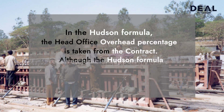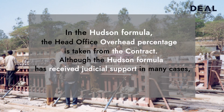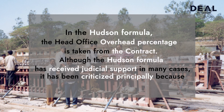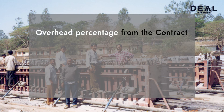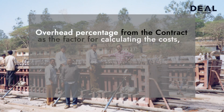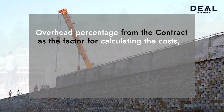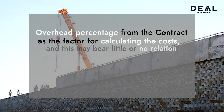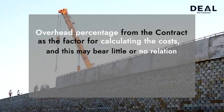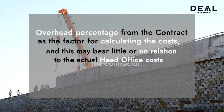Although the Hudson Formula has received judicial support in many cases, it has been criticized principally because it adopts the head office overhead percentage from the contract as the factor for calculating the cost, and this may bear little or no relation to the actual head office cost of the contractor.